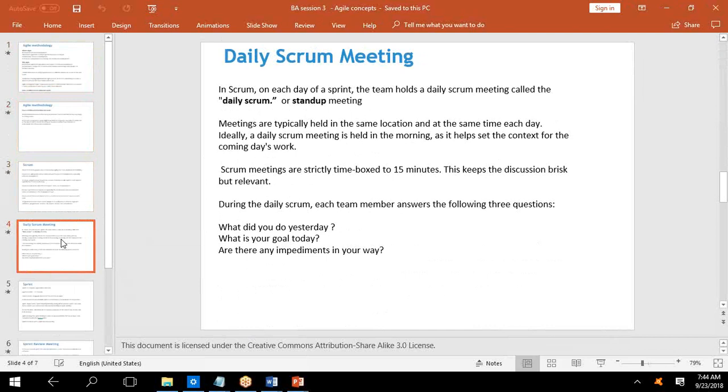Everybody will speak only these three things in the meeting, not beyond that. What did you do yesterday? What are you going to do today? And are there any issues? Are there any blocking issues for you? That's it.